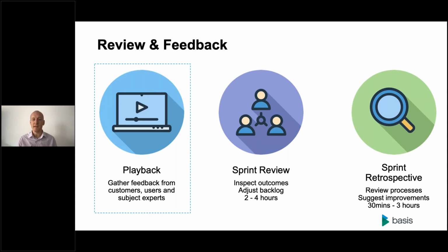The sprint retrospective is more about how we delivered it and talking about ways to improve the process, whether that's people, processes or tools. How can we work better? What bottlenecks did we have? What things tripped us up? How can we get past those? What assumptions maybe did we make that we shouldn't have? The sprint review will be anywhere between 2 and 4 hours, the sprint retrospective no more than 3 hours, and that length really depends on the length of your sprint and the amount of work you've done, but it's a very important part of the process in SAP as much as anywhere else.